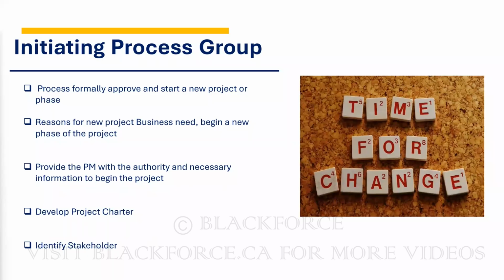That's what a project charter is to a project manager, right? It gives you authority to start using organizational resources. I can now start discussing with different functional managers that I need this developer, can I get this tester, I need this tester on my project. If you don't have that charter to say you've been approved, you can't start doing that. So that's what a project charter does. A project charter doesn't have to have all the details, right? Sometimes it can just be an email from one of the steering committee members. But if you're a good project manager, and they don't have a good project charter, you can help them put a good project charter in place, right?